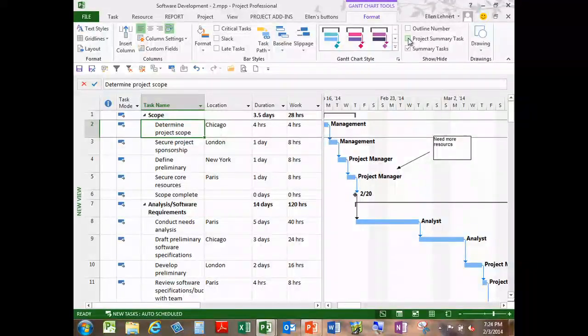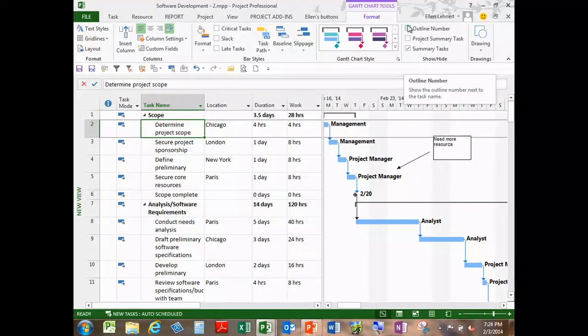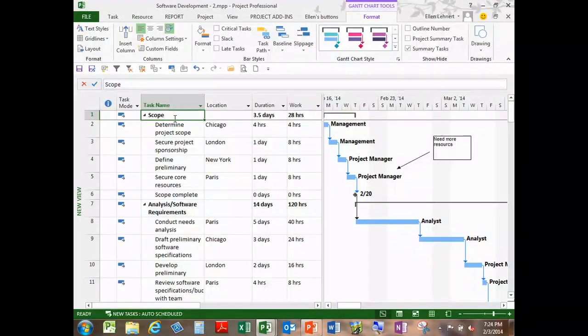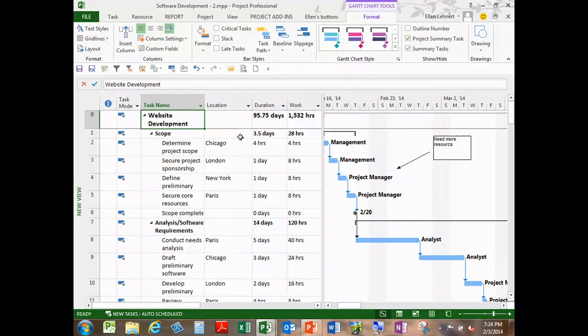You're losing functionality. It's expecting the first summary task of the project to be level 1. If you don't use it, you lose that ability. And there's a lot of things, like filters for high-level tasks. They're talking about level 1 summaries, and this is all pre-programmed in here. So please use your project summary task. I find it extremely helpful also if you're going to combine projects.